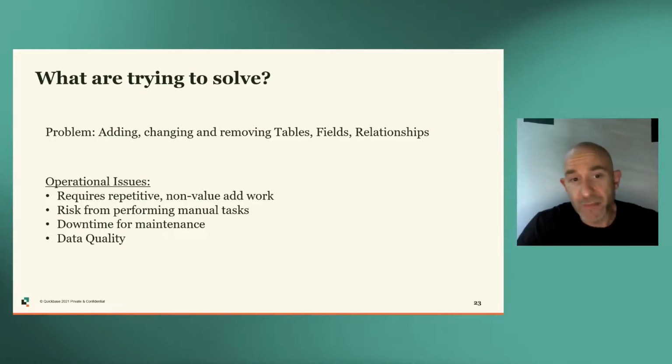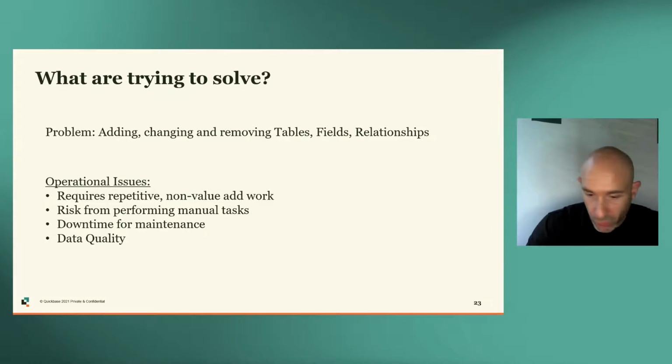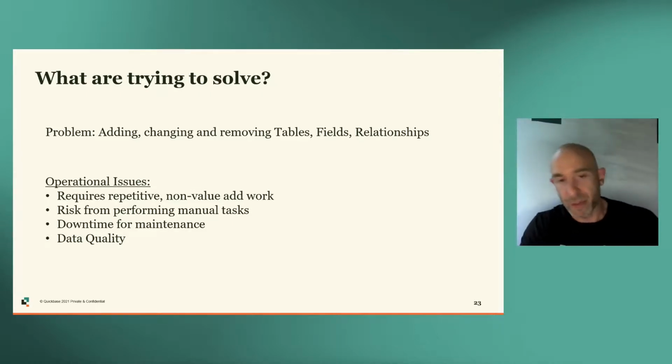And there's going to be downtime for the maintenance. So you're probably going to have to plan this out, and maybe you take the system down on Friday afternoon, get all the work done, and then put it back Monday morning. But while you've got downtime, you might even have a data quality issue, because you might have other systems that are running 24/7 while you pulled this offline. Now you've got to update that with anything that's changed during that downtime.